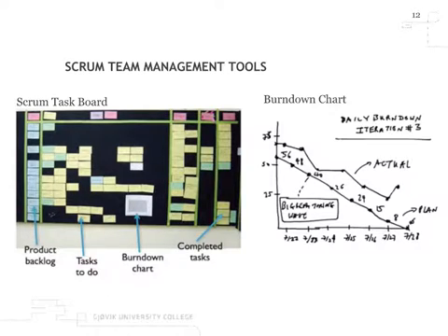You also have what's called a burn down chart. Anybody knows what a burn down chart is? It's your intended progress of the days. Yes. The straight line is the intended progress. And this not so straight line is the actual job that you have done, the issues that you have resolved.